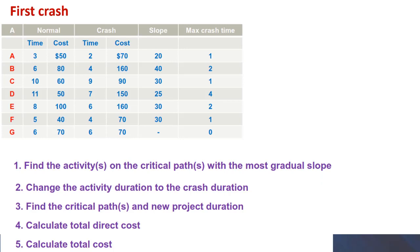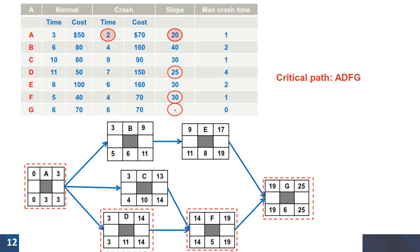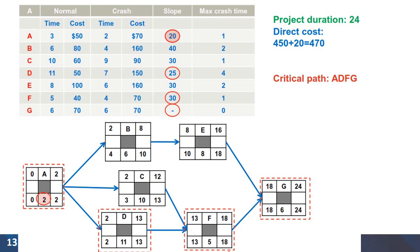So we need to follow different steps for project crashing. The first step is to choose between the activities on the critical path and the cheapest activity to crash in our case is activity A with the slope of 20. We can then add the additional cost of 20 to the previous cost of 450 and also redraw the project network and find a new critical path for the project.